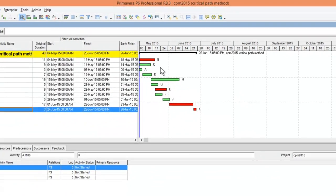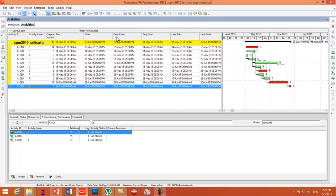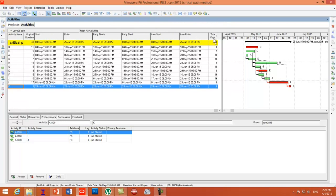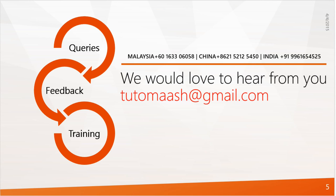The last step is to schedule the activities — just press the Schedule button or press F9. Now your project is scheduled. Click the relationship icons so the relationship lines display. You can see the program has calculated all data: early finish, early start, late start, late finish, and total float for every activity. In the Gantt chart, red bars represent critical activities — B, E, I, and K — the same as in our slides. That's the end of this session. Please mail your feedback and queries to tutomash@gmail.com. Thank you.